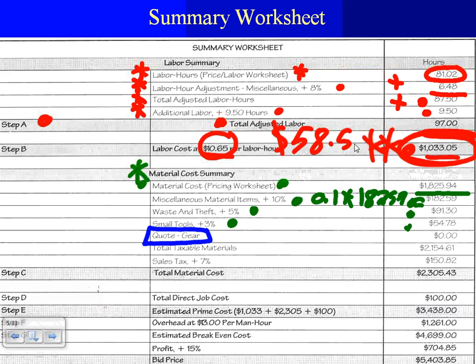So you count all the different types of lights, the lighting schedule that you guys did with Chad, with all the types and the number of the lights and the description, you send it to 3 to 4 vendors. And those 3 to 4 vendors will give you a quote, a lump sum, bulk price for all these fixtures together.